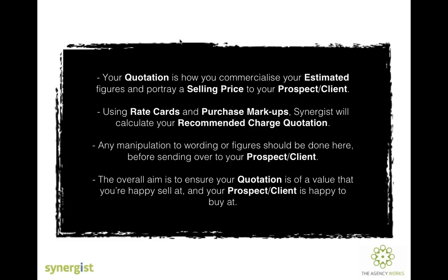So this is where the quote comes into play. The estimate is your internal view: what do we realistically need? The quote is, right, now let's commercialize this. We've got our estimate, but now what are we going to sell it for? Obviously, in a perfect life, we would just take the estimate and send that as the quote, get that approved, no changes needed. If there are changes needed, you do it within the quote, not the estimate, because the estimate is what you actually need, what it is going to cost and what you should be charging. The quote is externally what we are going to sell this for.